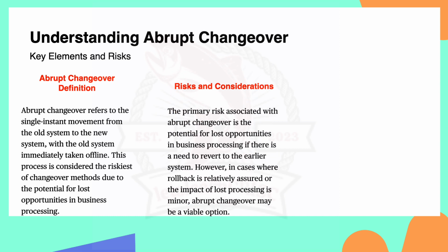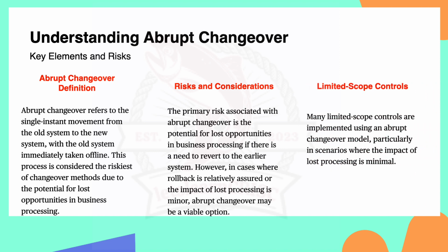Sometimes it is considered risky also, right? Because this method is considered the riskiest among the changeover processes. If there is a need to revert to the previous system, there is a potential for lost opportunities in the business processing, right? Imagine upgrading an online shopping platform using the abrupt changeover. So if an issue arises with the new system, reverting to the old one might lead to lost sales opportunities during the transition, right?